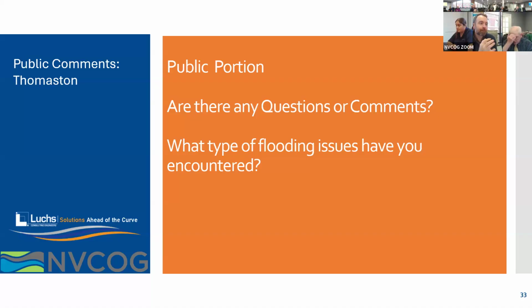Yeah, the next steps would be using the preliminary design we're doing to get funding for final design. As part of final design, there would be soil testing and borings where they determine exactly how much ledge is out there and how hard it is. And then we'd have to update the design and the cost estimates for that.